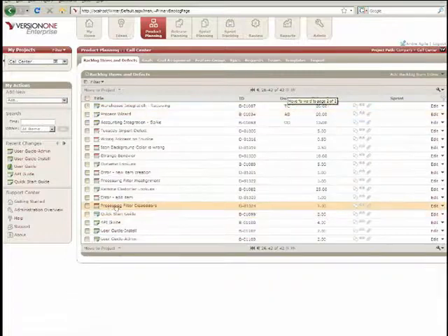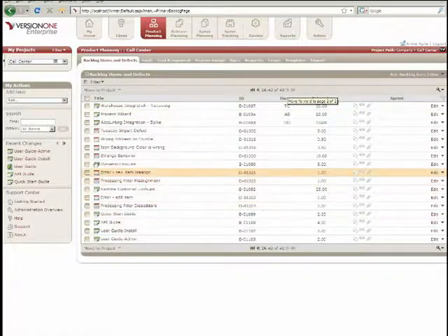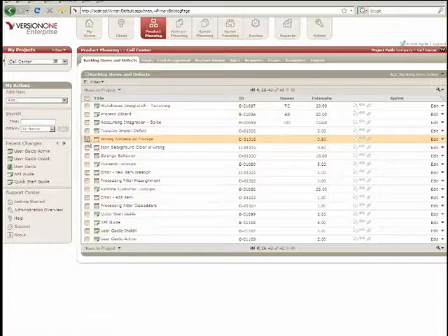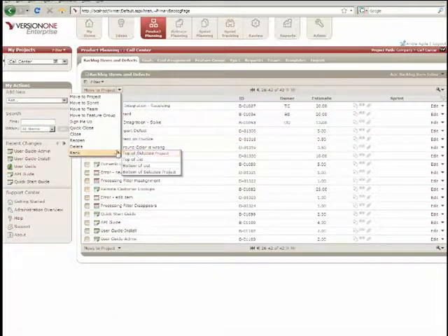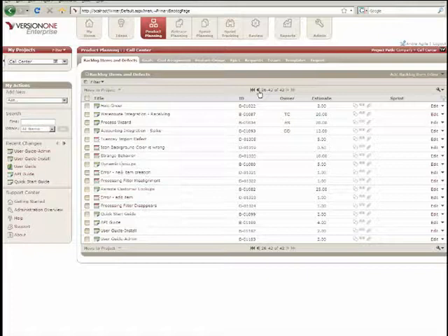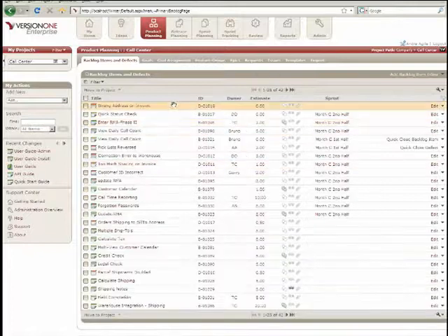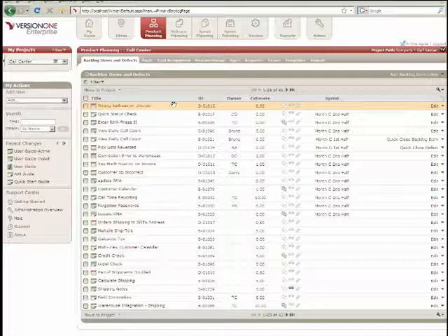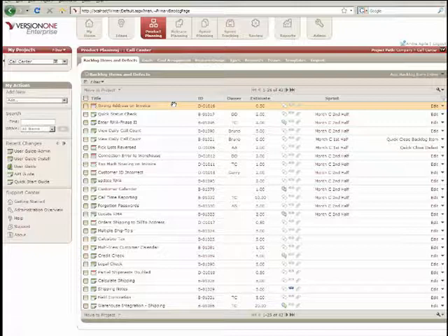If a defect comes in that needs to be fixed right away in this next sprint, say, wrong address on the invoice, I can go ahead and check it, and I'm going to move it to the top of the list to make sure it's ranked to get fixed immediately or in the next sprint. And sometimes, though, we understand the contract between the product owner and the team is, once the team commits to work and the product owner accepts that, not to introduce anything else during that sprint. That is the Agile mandate. But let's be real, okay?